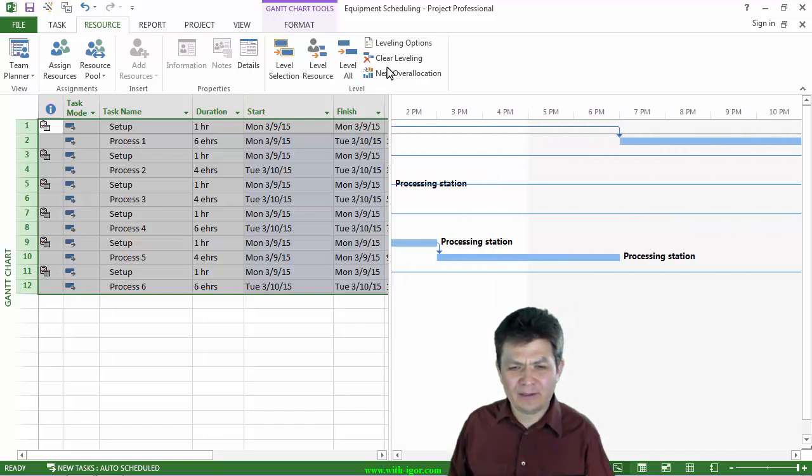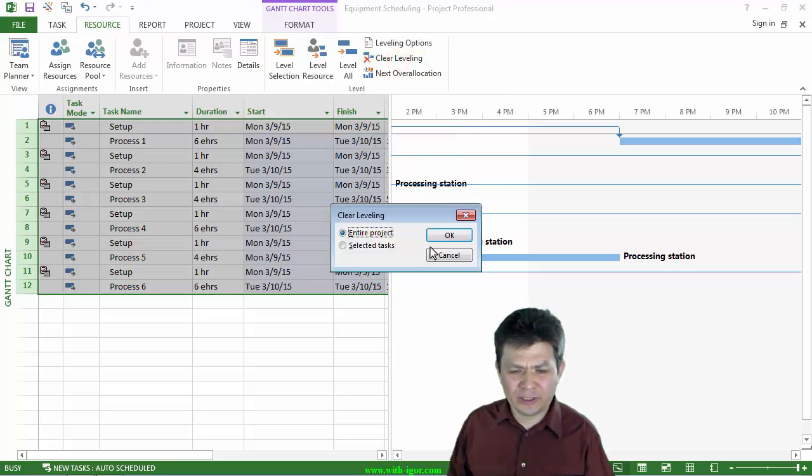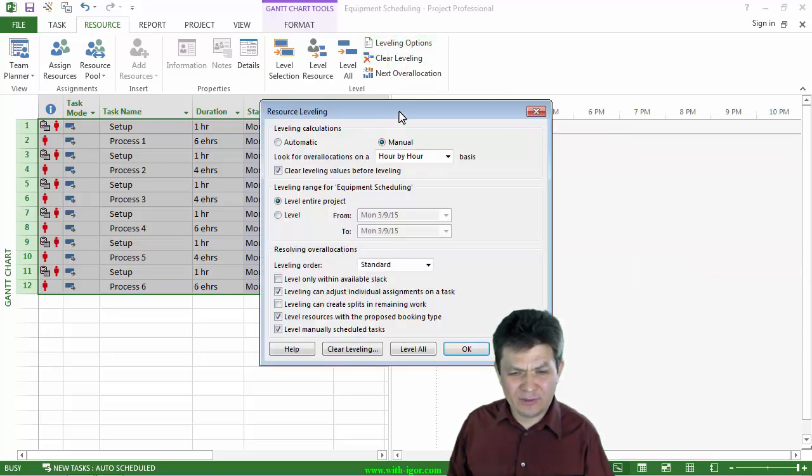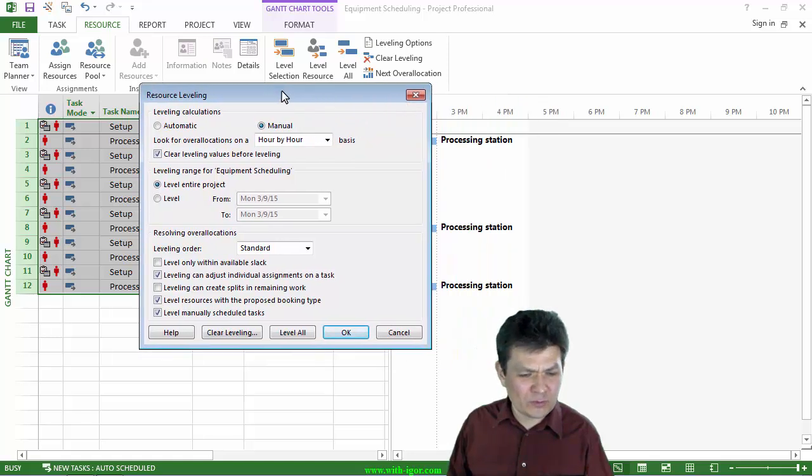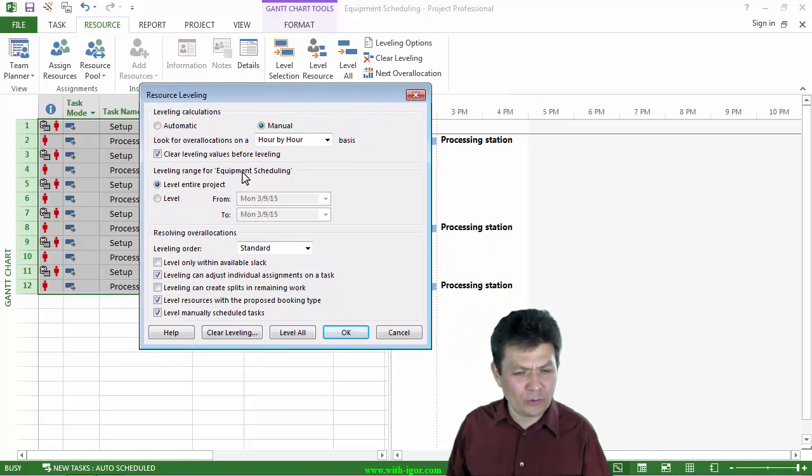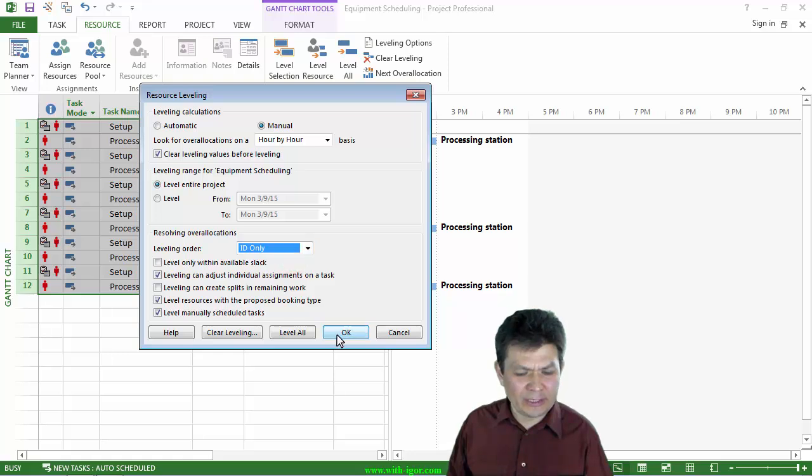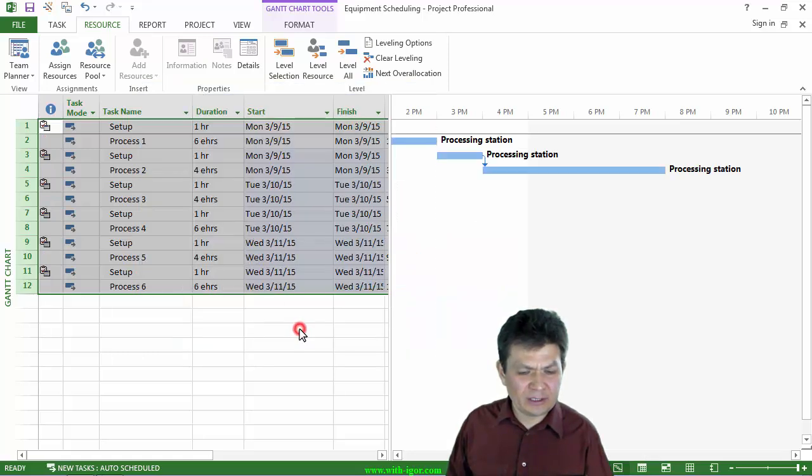So that leveling didn't work. I need to clear leveling and make sure that's important with this particular workflow that I am leveling based on ID only. And I can click level all.